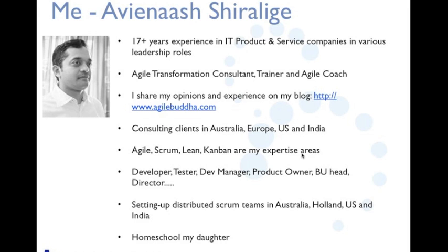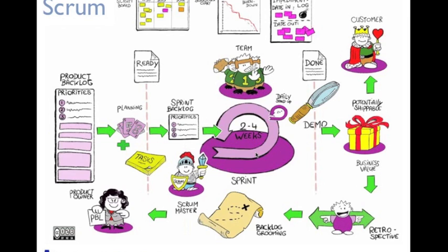Okay, so this interesting picture depicts Scrum. There are a lot of activities that happen within a Scrum team. Product prioritization, creation of requirements, and analysis are definitely done by the stakeholders and the product owners, and the team also gets involved in planning, analyzing the requirements, and coming out with a sprint backlog. Plus you get into a 2 to 4 week sprint to deliver something really lovable by your customer, something they would love to look at and share feedback on.